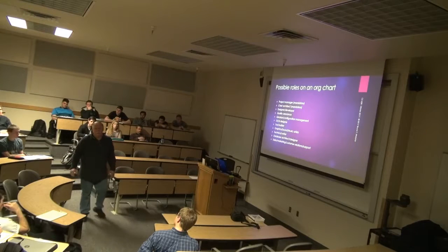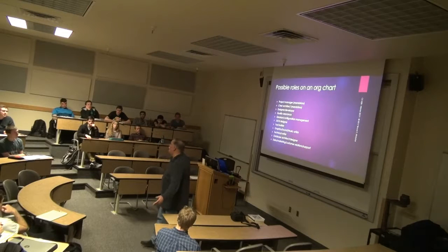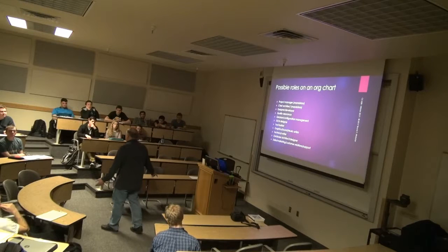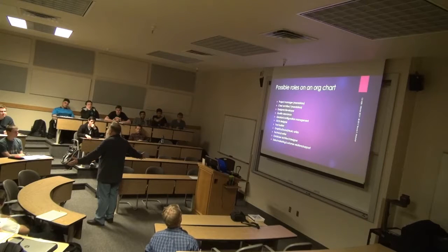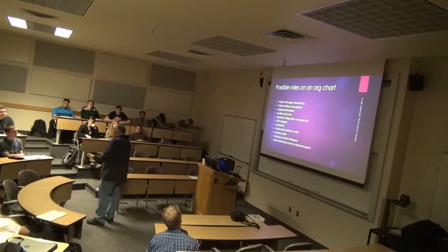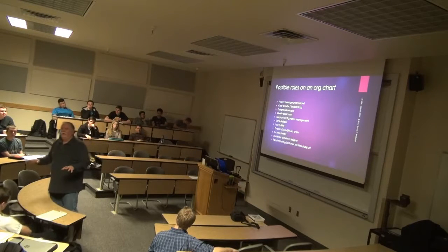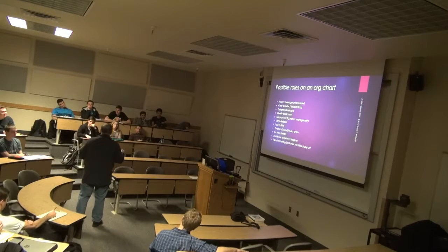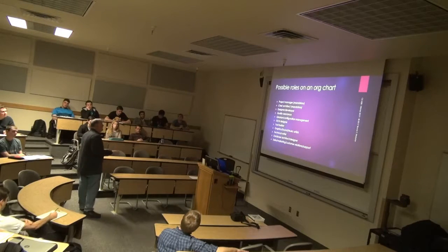If you go back to The Mythical Man-Month, when Fred Brooks talks about it 20 years later, he teaches a class in software engineering and says that he reached the point where he would always make sure that each team, you'd have projects in class, each team always had a separate manager and a separate software engineer. The manager is there to make sure the project gets completed. The architect is there to think deep thoughts and to come up with solutions that will encompass what you want to implement when you start to implement it.